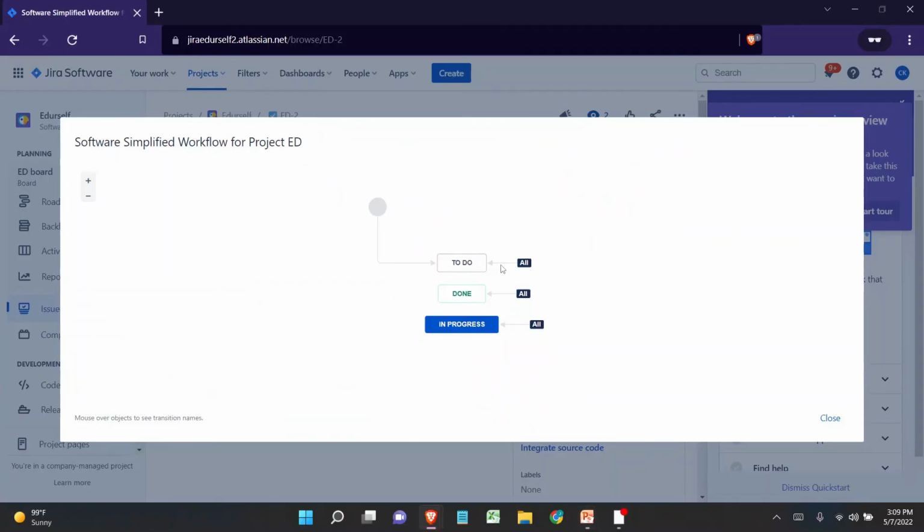All we can see is a transition marked all. So what is the name of this particular transition? It can be called a global transition. If there is a global transition to any status, the user can freely move from any other status to this particular status.